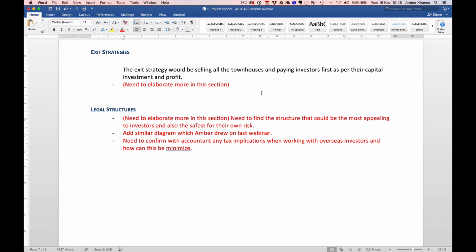Okay, I've been doing my numbers on 60/40 because of the macroprudential measures introduced by APRA to curb the property market. All top banks have lowered their LVR. I know that's crazy. For the 12 units that we just finished, the bank gave us 70%, no problem.